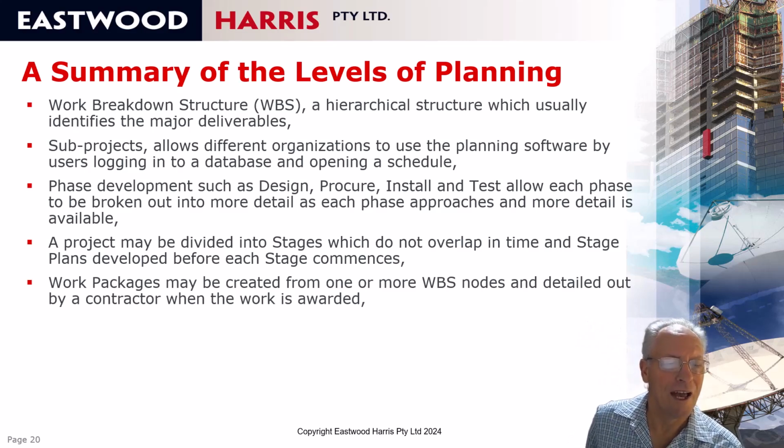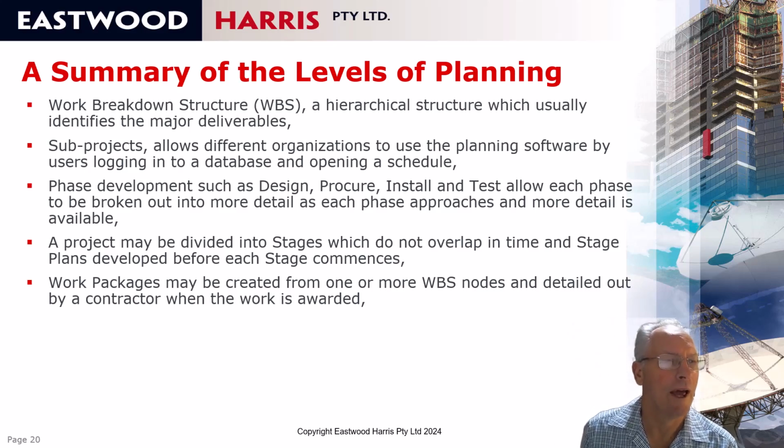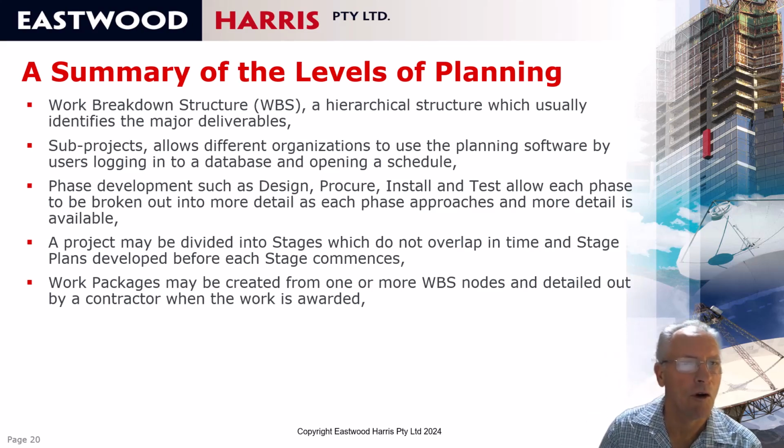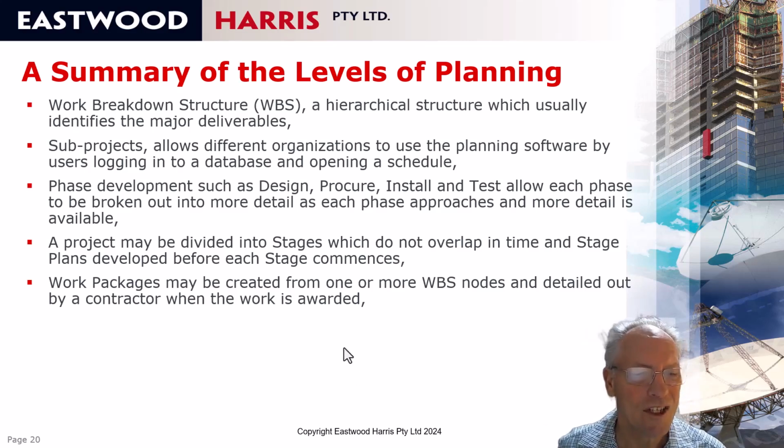Work packages are interesting, used a lot in the mining industry. For example, if you're doing an underground mine, you would have a work package for the excavation, and the mining company would have an excavation program. Then the program might be handed over to the concreting people who do their work package and put the concreting work in, and then that schedule will be handed on to the mechanical installation. So you tend to build one program on top of the other. It's quite a difficult method to manage projects. I've used it on a few underground mining projects.